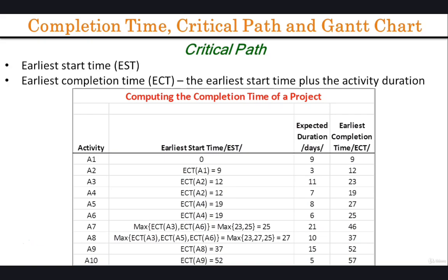And for this project, we will get this table. For the activities, their earliest start times calculations, duration, and earliest completion time. This table is created from the top to the bottom, one activity at a time. As you construct a given row I, you have to ask yourself, what activities provide information to I? What activities does I depend on? You can see this by reading row I in the dependency matrix, or you can see this in the project graph.